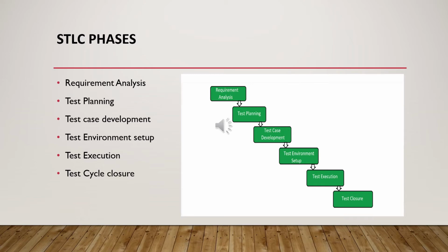Once the test plan document is ready, the test lead will set up a call with our business stakeholders and explain the test plan document, walking through it in the call by sharing the screen. Once they receive the sign off in an email, this test plan document gets frozen.